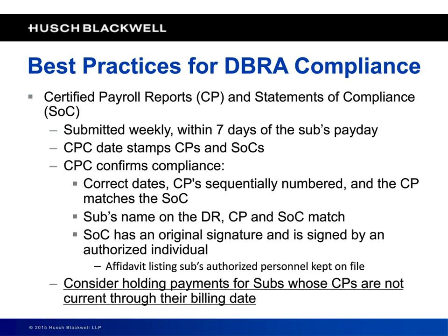And again, I can't emphasize this enough. If one of your subcontractors does not have complete and accurate records, consider not paying them, and make sure that your subcontract indicates that if they don't have their certified payroll records and Davis-Bacon Act compliance records properly submitted to you, they don't get paid.